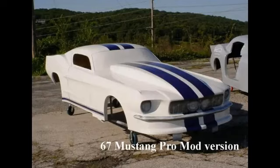Total budget excluding buffer, 15% equals $45,900. Total project budget: $280,000 equipment, plus $4,800 labor, plus $2,500 calibration, plus $7,000 software, plus $45,900 buffer, equals $340,200. Procurement process, request for proposal, RFP.